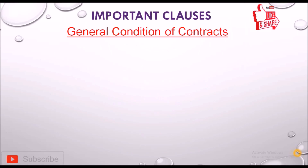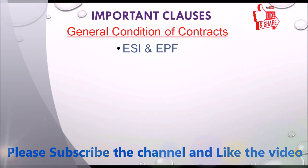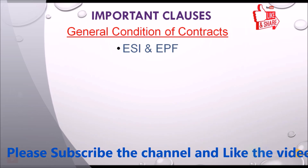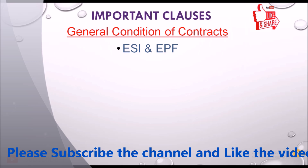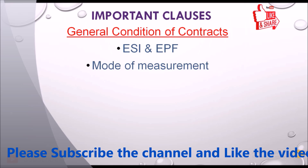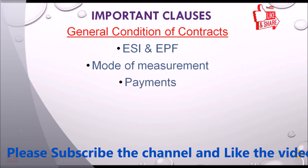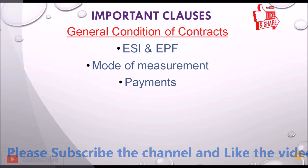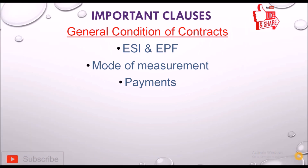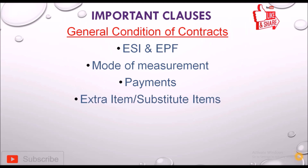ESI and EPF — the contractor is also responsible for Employees' State Insurance (ESI) and Employees' Provident Fund (EPF) contributions. Next is mode of measurement — the method to be followed is described in this clause. Next is payment — how payment will be given, whether any advance payment will be given, how the running account bill payment will be released, and whether any ad hoc payment will be released.